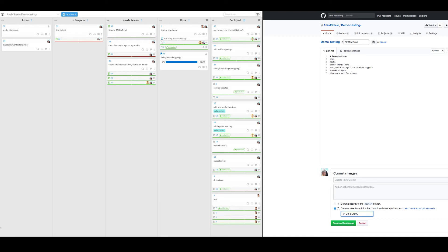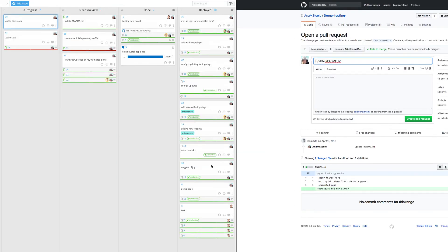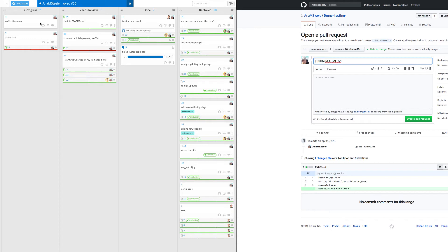We will assume that issue number 38 has been refined and prioritized by our product owner and is now ready for a member of the team to pull. Issue number 38 has moved to our in-progress column based on the action of opening a related branch, and I've been automatically assigned to the card since I was the one who opened the branch.